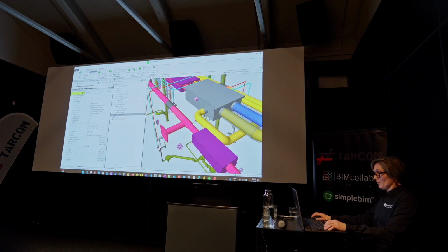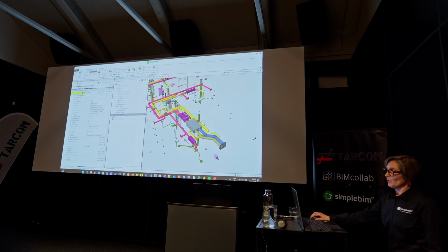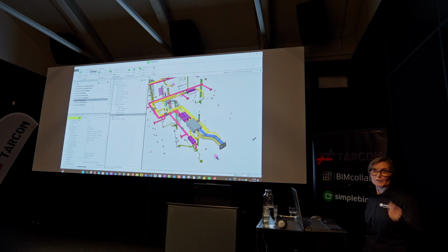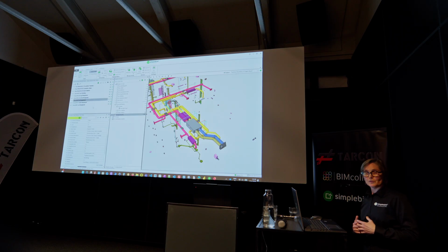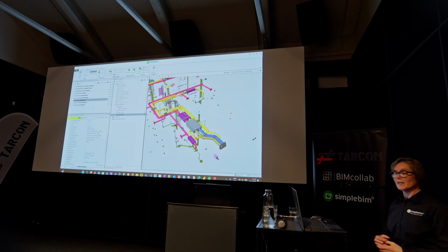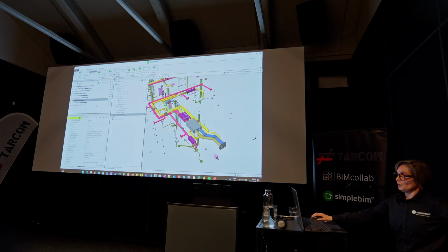So I used this for finding those clashes or inlets because every single one costs money, and it's very hard to track what is done and where. And when design changes during the process, you just need to trust the subcontractor's word on how many. So this is a way that you can just automatically run and immediately see how many and where that kind of inlet should be.